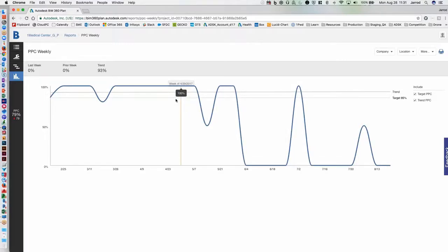I want to stress again, this needs to have an eye to it. What will happen is if you get long durations of 30 days or 40 days or more of scopes of work, it'll kind of skew the view of this. You'll have basically a ton of things that are in process but nothing completed. So the best practice to use the system, and also to separate your scopes of work, is to define those into, instead of a 40-day chunk of work, maybe four 10-day chunks, so that you'll start to get some clarity and intercede if you need to, based on any known factors that you pull out of the system.